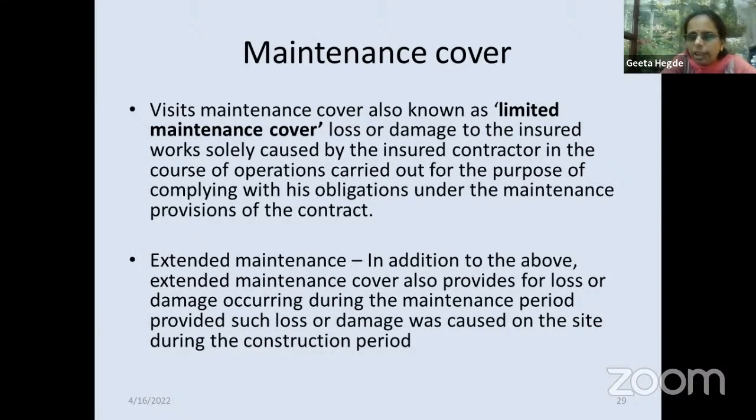Now, there is an erection period and there is a maintenance period. In the erection period, the erection is completed, then the maintenance period starts. In the maintenance period, there are certain jobs or obligations of the contractor. If there is some damage in the maintenance work under the contract given for maintenance, that is covered by the limited maintenance cover or visit maintenance cover. Extended maintenance is a wider cover.